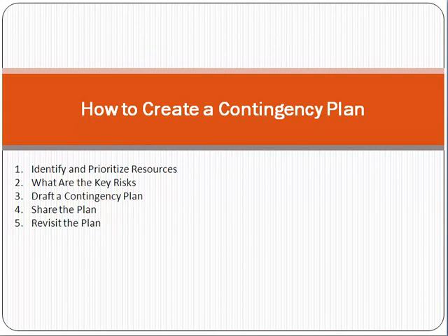Friend, how to create the contingency plan? Identify and prioritize the resources. Identify what the key risks involved are. Draft a contingency plan and share the plan with the stakeholders, like the customer and your senior management, and revisit the plan after a few days.